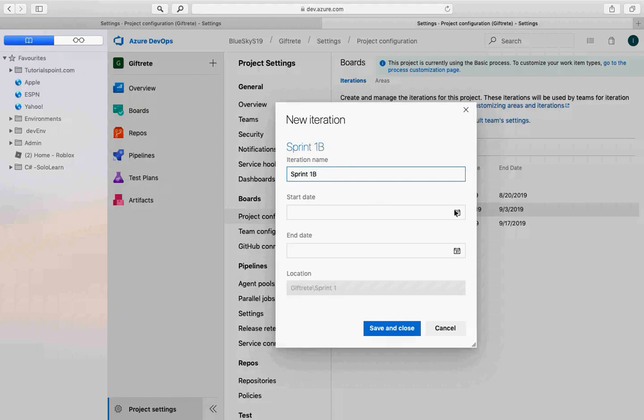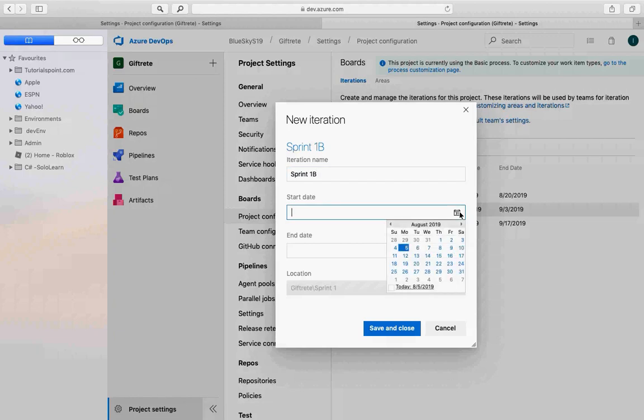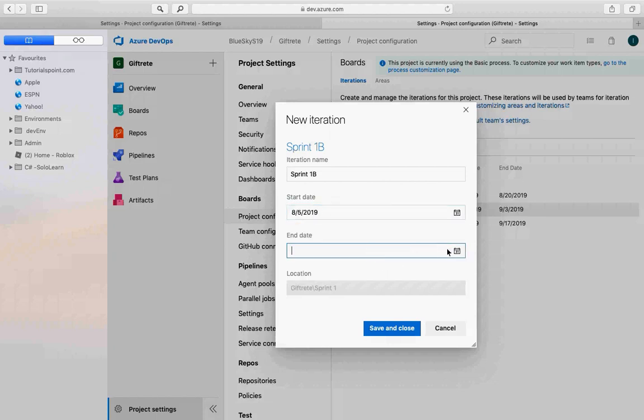The only thing that can make this happen is when you do 4-week sprints and want to break them up. For instance, if you are doing a monthly sprint and a month is too big, you want to break it into 2. Then you will have sprint August, and then August A and August B. August A will be the first 15 days, then August B will be the later days. So that is where this is applicable, to be honest. Apart from that, I don't think it's widely used.